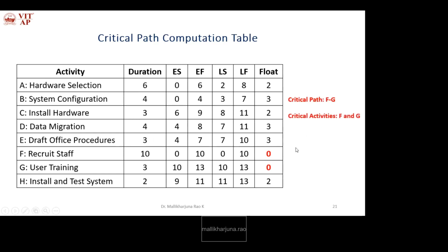What are the critical activities? F and G. So what do we mean by these critical activities? We need to pay more attention to these activities, and start these activities immediately when the project commences. Okay, we have two critical activities in this problem, that is F and G. Pay more attention to these two activities and finish the project at the earliest time. Thank you.